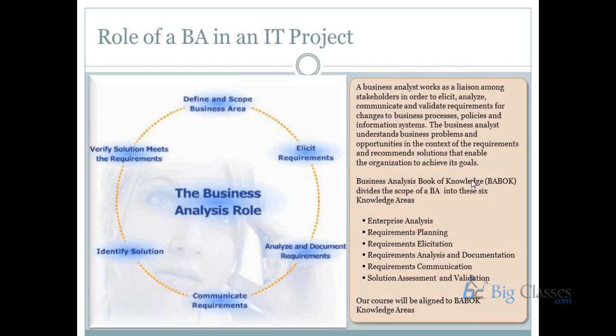Planning would be during the initial stages of the project, where your project manager owns the complete project plan, and you as a business analyst would contribute from the requirements point of view. Similarly, a technical architect would contribute from a design and development point of view. A tester or a QA analyst would provide inputs from the testing point of view. All these inputs are collated, and then the project manager would prepare your end-to-end plan. So that's the role in your planning phase.